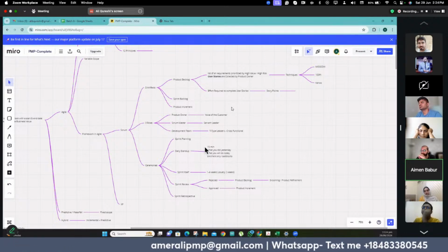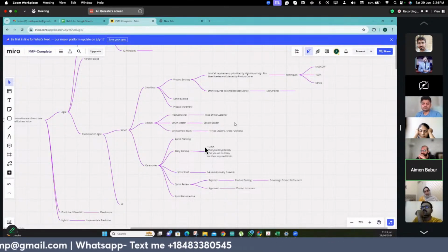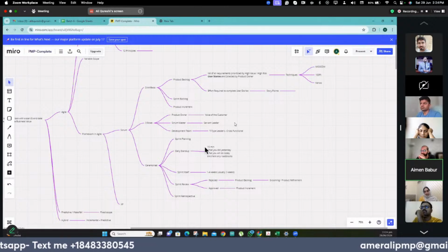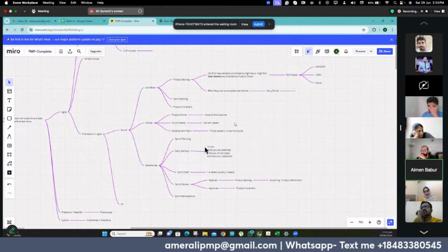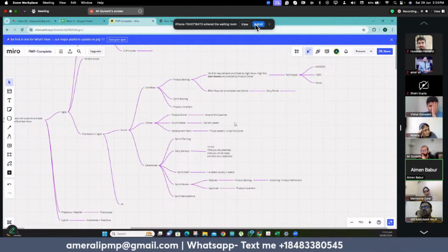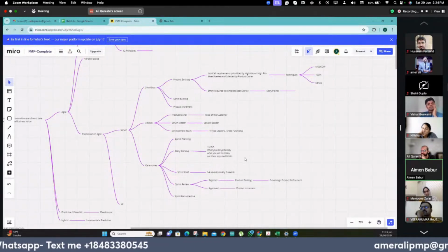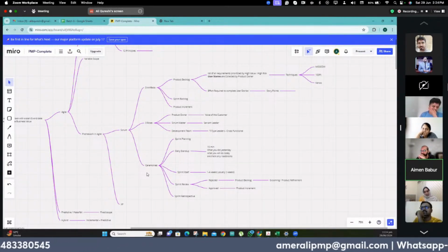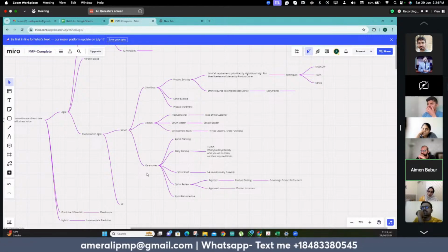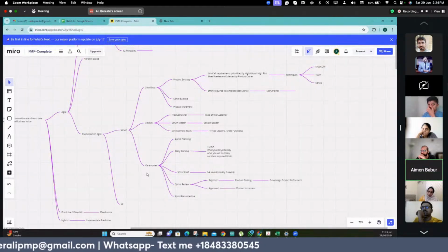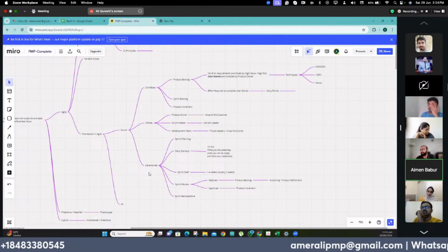Then we have three roles: product owner, Scrum Master, and development team. The product owner is the voice of the customer, and he is controlling the product backlog basically. And the Scrum Master is basically a servant leader. In the development team, we need T-type leaders or cross-functional members, and we do not need subject specialists for agile. Then we have five ceremonies for Scrum. The first one is the sprint itself. The second is sprint planning, in which we plan for a particular sprint. We compile a sprint backlog in this ceremony.